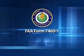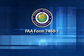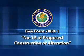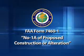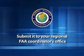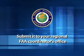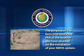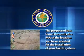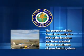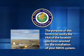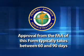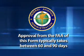You will then need to complete FAA Form 7460-1, Number 1A of Proposed Construction or Alteration, and submit it to your regional FAA coordinator's office. The purpose of this form is to notify the FAA of the location you have selected for the installation of your AWOS system. Approval from the FAA typically takes between 60 and 90 days.